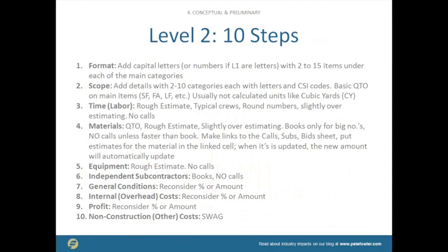And on the right elevation, I've got 6 windows that are all on average 4 by 4, whatever. We're starting to break it down. What's it going to cost for material, and what's it going to cost for the installation of those windows? And so we're breaking it down at a greater level. So at the end of this, we might go, wow, I was a little bit off. I think we're only going to be at $75,000 for these windows, and that's the refinement process.